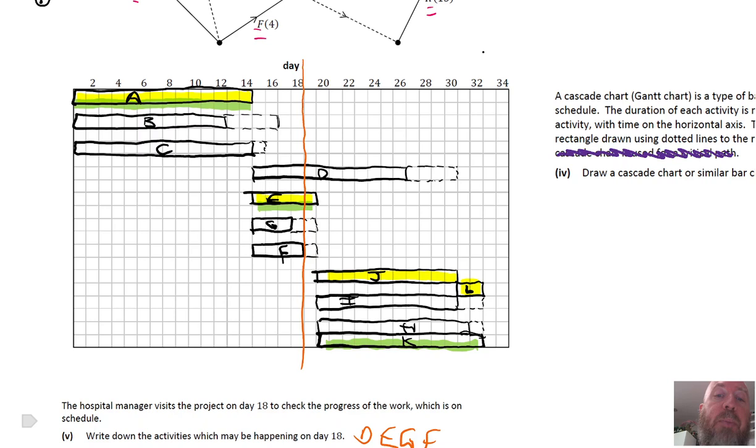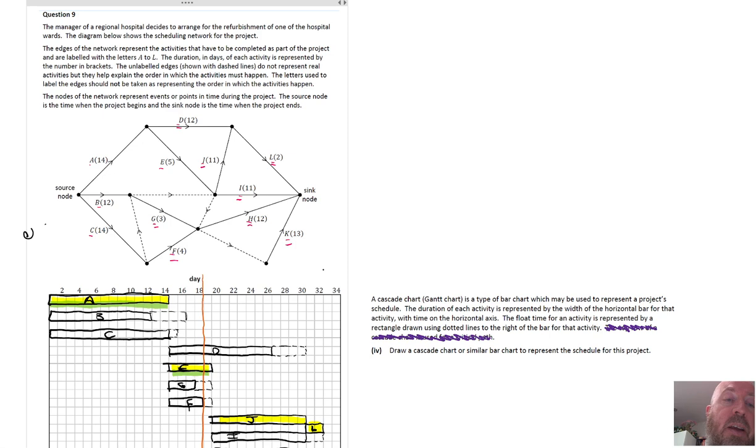They're okay. I reckon if it happens, it'll probably be after the fact, once you've got your early time, late time chart. So you just write your critical path along the top, and then you fill in the stuff when it has to happen, based on the dependencies, which I will happily do again, or do a video for that if you wish. But I think if you can start it from scratch, then you'll be able to fill it in if you know everything before that. So yeah, I hope that helped.